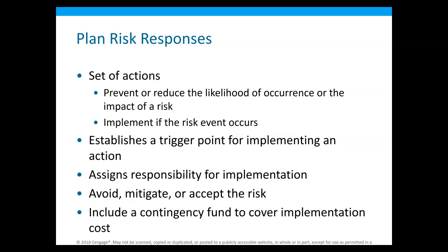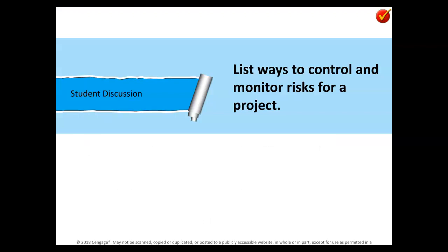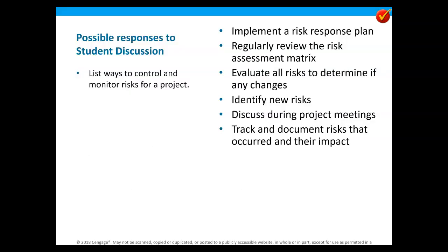So we use insurance as a contingency fund as a way to mitigate that cost to us. And really what you're doing then, the insurance company pays the $50,000 and then over the next 10 years you pay back to the insurance company, right? So there are a lot of responses that we can do in here. So in our building project for painting, we may have a bond fund that we've agreed to, and they'll bring somebody else in to actually do that.